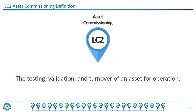Asset commissioning is defined as the testing, validation, and turnover of an asset for operation. It consists of the processes that ensure assets are functional before they're installed, and then functional when they are installed in their operating environment, and then proven to be capable of fulfilling their design function and ready for release for production.